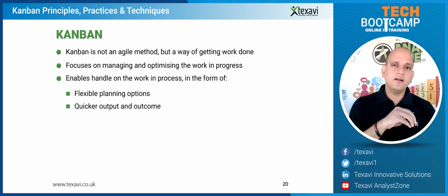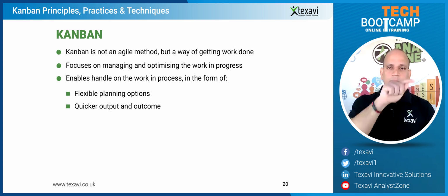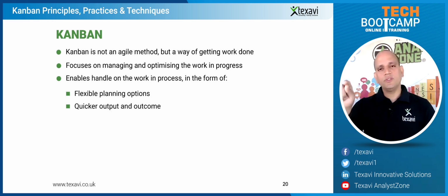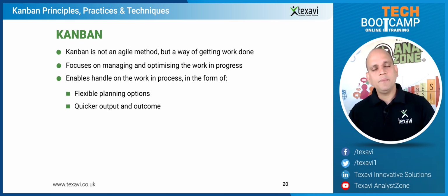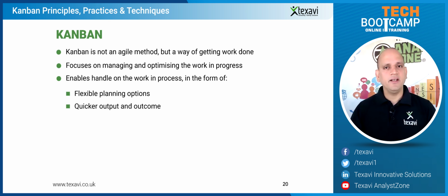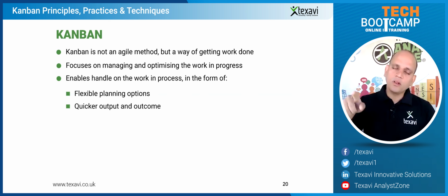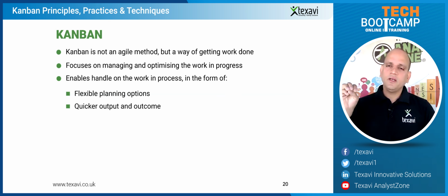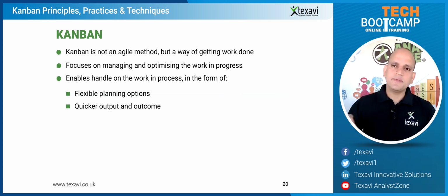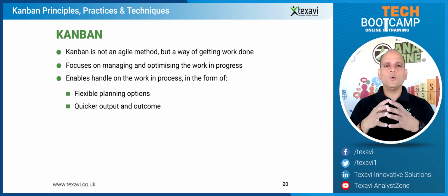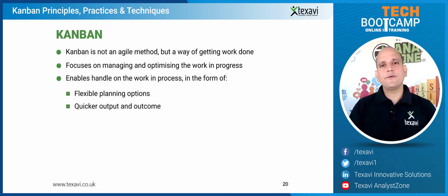But if that defect cuts across from the requirements through to the architecture, through to the design, through to the development, and finally you find it in the testing, it's got to go back all the way because there are so many people's efforts involved, so many traceability steps that need to be understood, and you've got to waste so much time. On top of that, you need to do a lot of rework to fix that defect. But if it was caught earlier, then you have actually saved all these things, right?